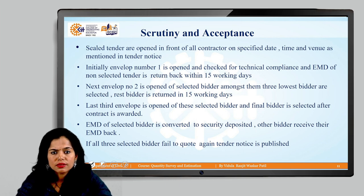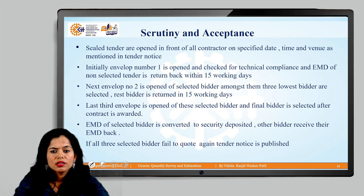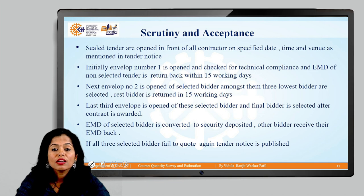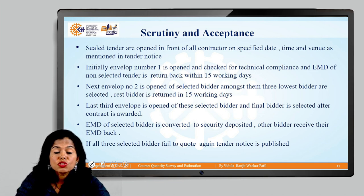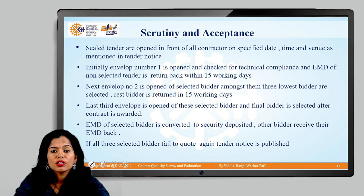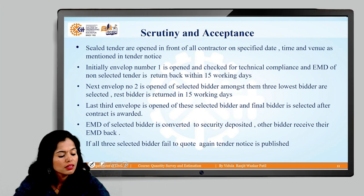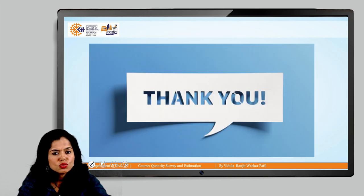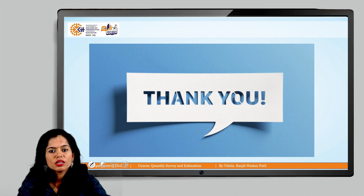After finalizing the contractor, a notice is given that they have been awarded the tender. The procedure is complete when the contractor accepts the bid and the award of contract is done. For any queries regarding the contract proceedings, you may ask. Thank you.